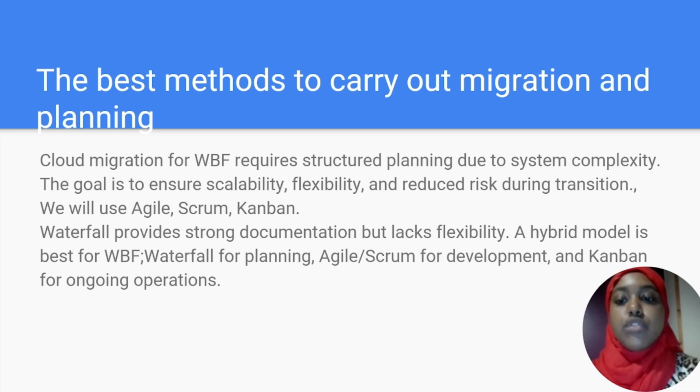A hybrid approach is often adopted for migration projects. For WBF, combining the structured planning of waterfall with the flexibility of agile to achieve an effective balance is recommended, as the waterfall phase will cover the requirements, Scrum is used for iterative configuration, and Kanban for ongoing operations.